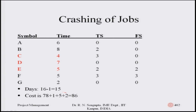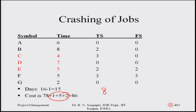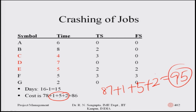The cost structure increases on three accounts: one day reduction in C costs one unit, one day reduction in D costs five units, and one day reduction in E costs two units. The previous total was eighty-seven units, so now it becomes eighty-seven plus one plus five plus two, which equals ninety-five units. Overall, costs have increased from fifty-five to ninety-five units while project duration decreased from twenty-two to fifteen days.